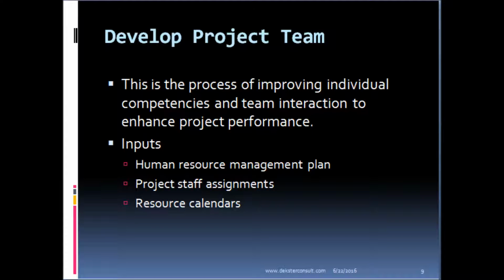We will make use of our human resource management plan, our project staff assignments, our resource calendars. Again, the resource calendars give us an idea about the availability of our team members. If you want to develop them, for instance, through trainings, you need to know when your team members will be available to undertake the trainings, and that is the use of the resource calendar.